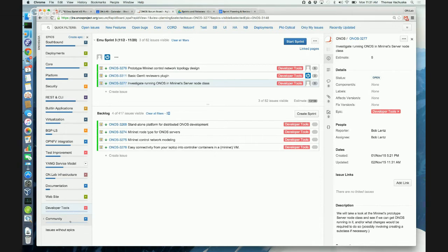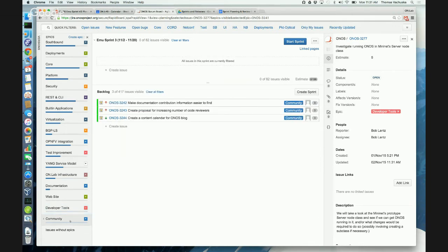Okay. On community, is David there? Yeah, I am. This is my first time, so I might not have done it right. I guess those are all backlog and not up in the sprint. No, this is perfect. We can easily see what's in the backlog. The backlog is ordered, so generally, the idea would be that we could start dragging off the top of the backlog into the sprint.